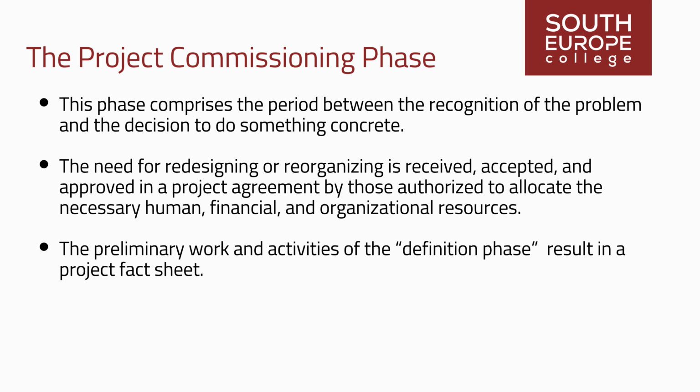The preliminary work and activities of the definition phase ideally result in a project fact sheet. The project fact sheet contains information on the strategic reference and the expected added value, an initial rough schedule, and the expected costs. It names the central project roles and, together with the business case, serves as a basis for deciding whether the project should be approved and included in the project portfolio.